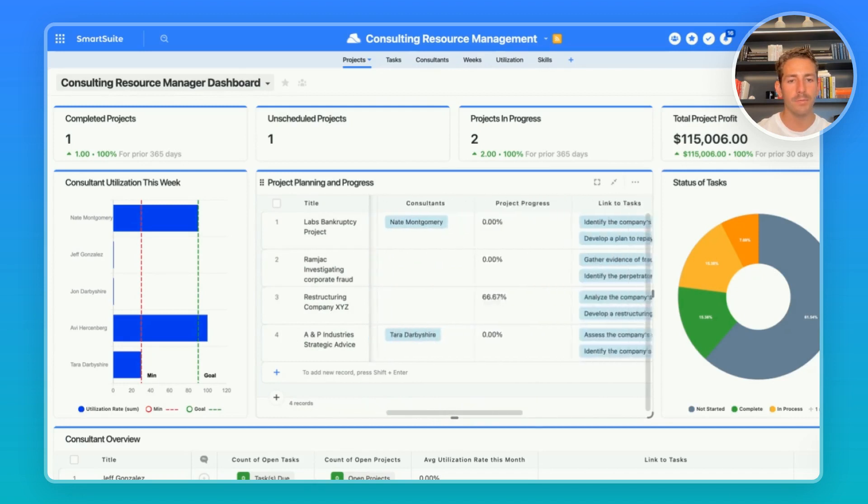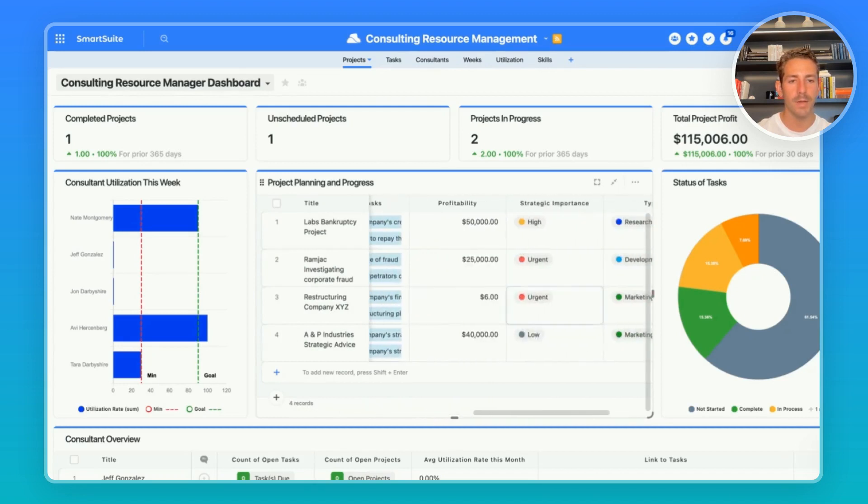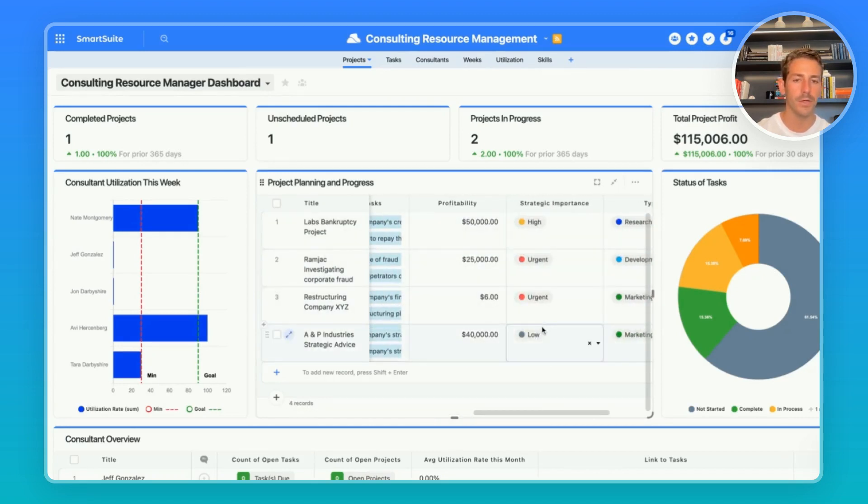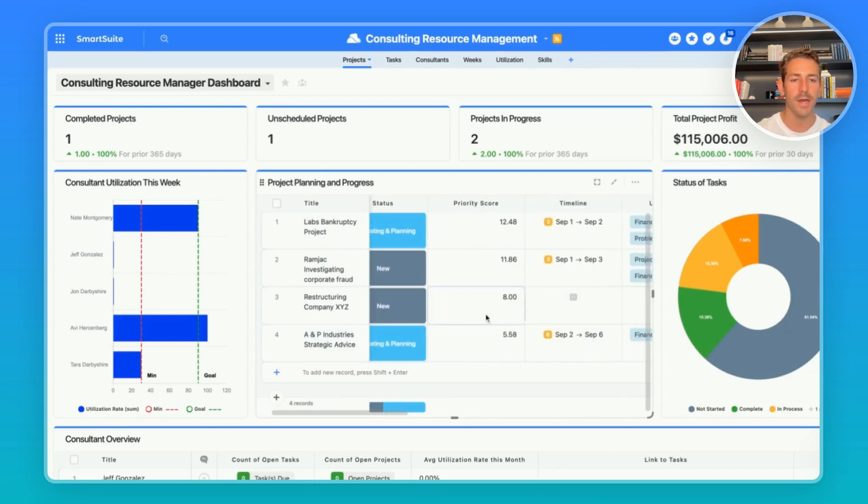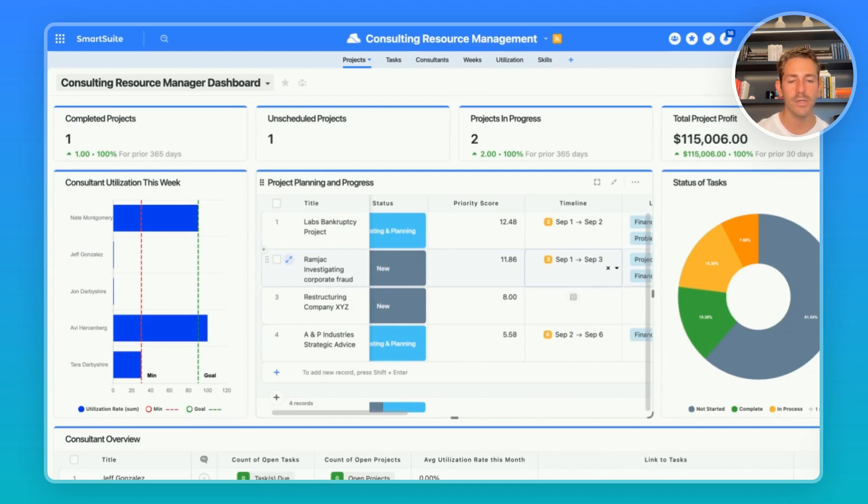This priority score is being calculated based on the strategic importance of the project, the profitability, as well as the timeline of the project. So as the date gets closer, the priority of the project is going to go up.